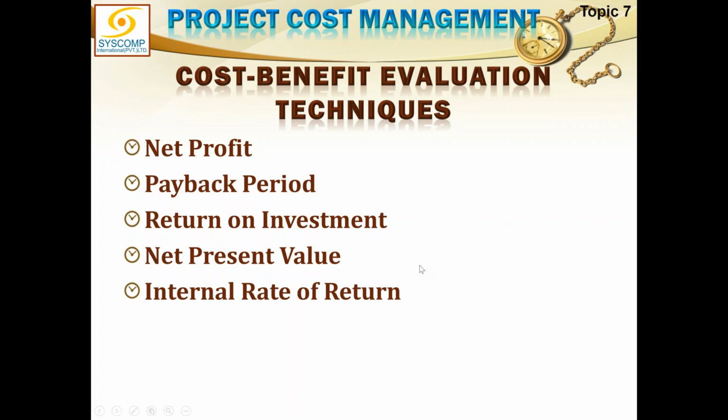Next is net present value. Net present value means: what is the value of money related to time? A 100 rupee note 100 years ago is not equal to a 100 rupee note today. Do you agree with me? Therefore, what we have done so far in net profit, in payback, in ROI, we have considered that money is money and it doesn't change value, which is a wrong assumption. Money which is going to come to me after 5 years is not equal to today's money. Therefore, net present value takes into account the time and the value of money increasing or decreasing according to time.